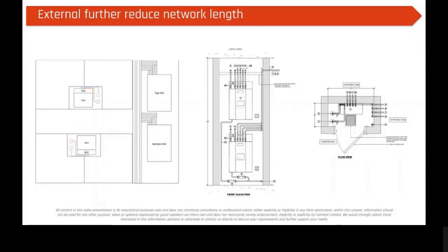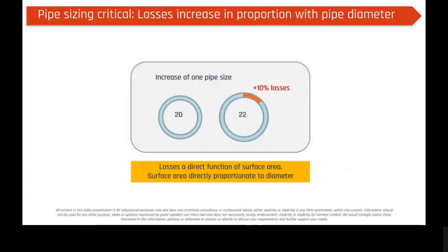The challenge is, this is architecturally something very different to conventional design, and it needs to be planned at RIBA stage 1 and RIBA stage 2, and you need to get the architects involved and supportive of this approach. By RIBA stage 3 and 4, it's nigh impossible to leverage into the scheme. So it's something that can have massive cost and operating cost benefits, but needs really, really early consideration in the design program and needs support from the developer, but also the architect. But you should see a lot more of that coming through, championed by the approaches set out in CP1 2020.